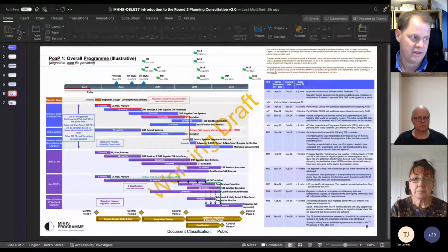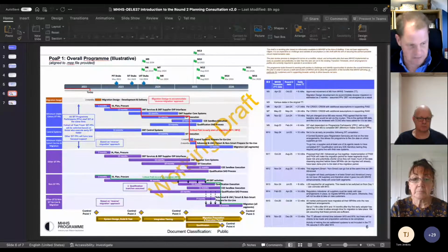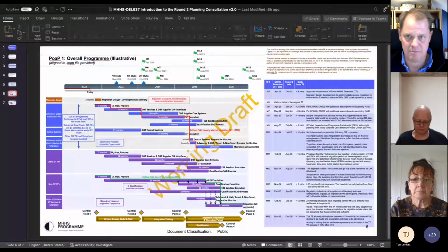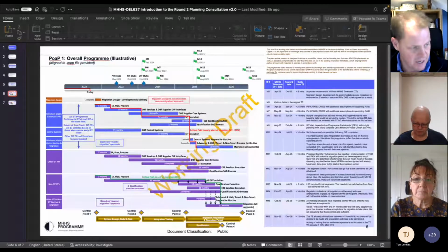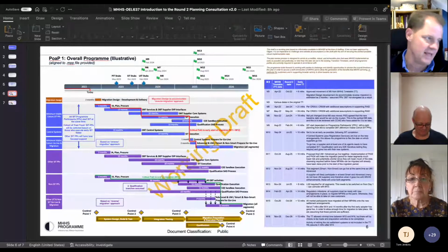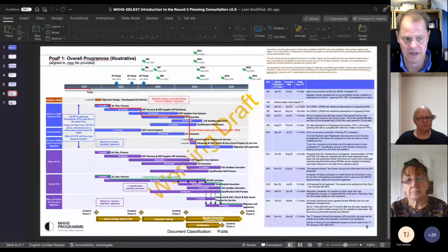This is why the evidence gathering is so important, because if St Clements came back and said it's going to take 3 years to build for these really complex sites, and it will take you an extra 18 months between M11 and M14, I'm exaggerating, obviously, Chris, but that then provides us with the evidence by which we can say, well, Ofgem, if we exclude those complex sites, this is the benefits we get as a programme, because we'll be able to complete migration quicker.